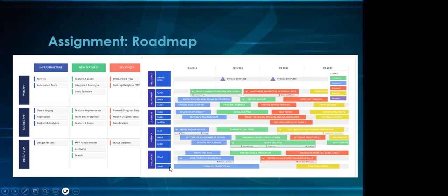If we have, thinking about what you guys are doing, it could be your homepage, and on your homepage you've got your menu, your body, and your footer. These are your features. So your epic would be the homepage, and then you would have the features of your menu, your body, and your footer.